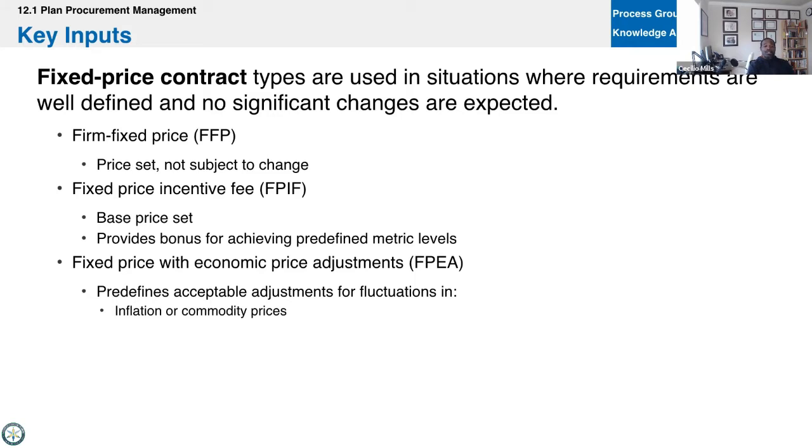There's a contract that the federal government uses. They're called point of total assumption contracts. Are you guys familiar with those? It's the point where there are cost savings. There's a predetermined cost ceiling. There's a share ratio. And after we hit the target cost, the desired cost, then we start sharing in the cost. So it's an incentive for the seller to keep costs down, because they'll actually pay in it. So let's jump into each of these.